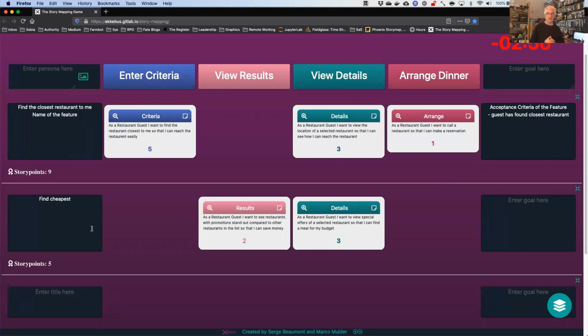One trick I use is in the naming of a Jira epic. I will effectively make one of these slices a Jira epic, and I will use braces. I'll put a higher level name to group the epics into a higher level thing. It's a kludge, but it's the best thing I know how to do with Jira.